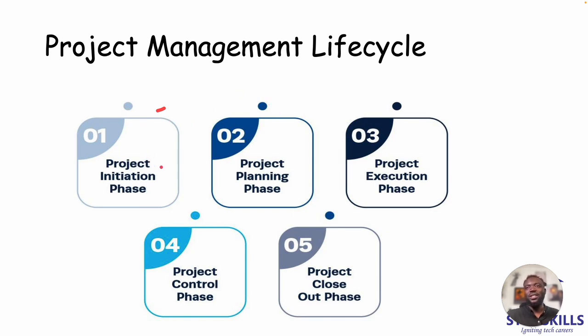And as I said, some of the components of a project charter or business case are the objective, the solution, potential benefits, the budget, things like schedule, how long you want the project to run for, what's the deliverable, what problem you are solving, who are the stakeholders, like who do you need to be able to solve this problem or execute the project, right?